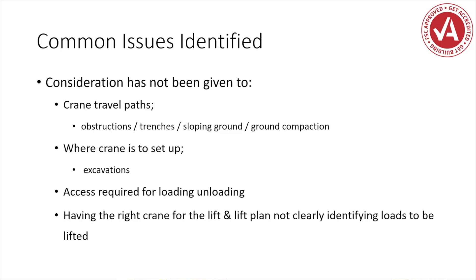Having the right crane for the lift and a lift plan clearly identifying the loads to be lifted is also important. We find lift plans are often very generic — they don't contain all the correct radiuses or loading requirements for where we're actually lifting. If we don't have the right size crane, that can obviously create potential for collapse because we haven't identified it initially in that planning process. There's a lot which needs to be considered, and while it doesn't happen all the time, these are common themes we do find.